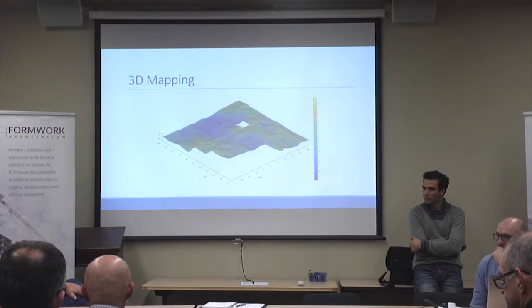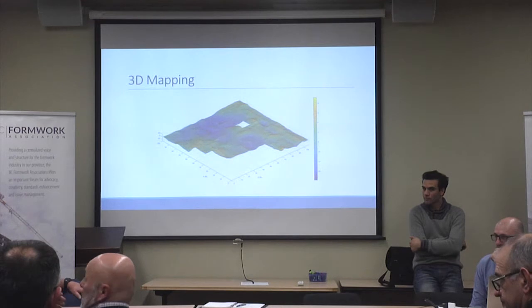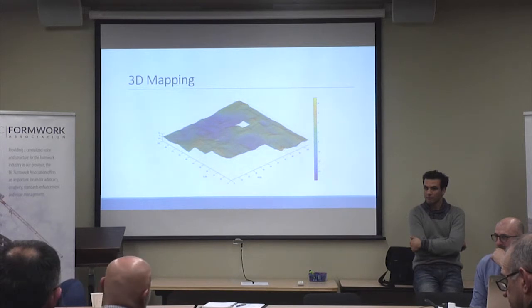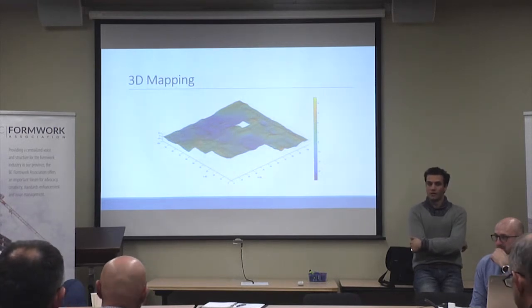So just to help you out with that, you're absolutely right. I think if we have the conversations in advance, it really makes a difference because you can't just cap something that's already been done. 9 times out of 10, the flooring installation companies will do a scratch test or a Mohs hardness test on whatever's been filled in, what we call bird baths. If it doesn't bond well, a lot of times the guys placing these little bird bath fills don't prepare properly, the primers aren't used, and now you have a complete debond. Now they come back to you and say, you did the original repair wrong. Why not do it right the first time?